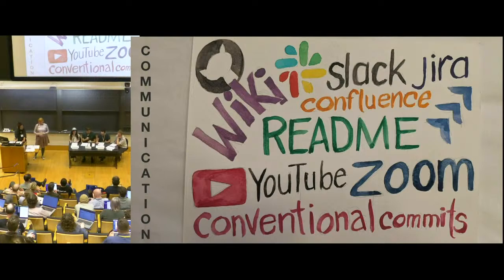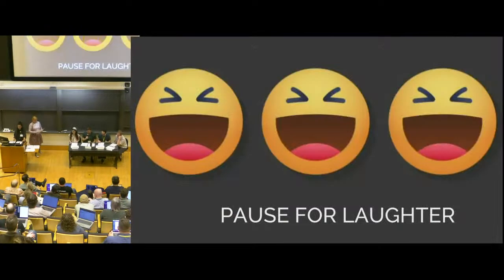Funny you mentioned that. Remember our early stakeholder check-in when the design was presented, and then they requested a total rebrand? Oh yeah, good times. Clear, frequent communication saved us. We immediately called it out as scope creep and managed stakeholder expectations of the new timeline, September 2025, and reprioritized tasks. Exactly. Clear tickets and constant dialogue prevent surprises. Good to know. See you at stand-up.